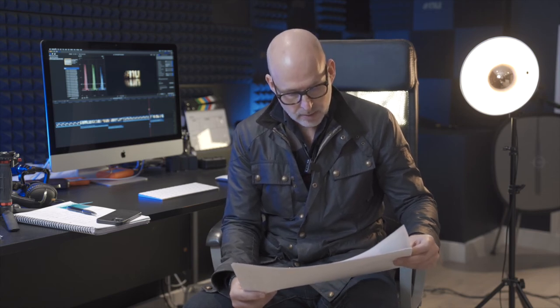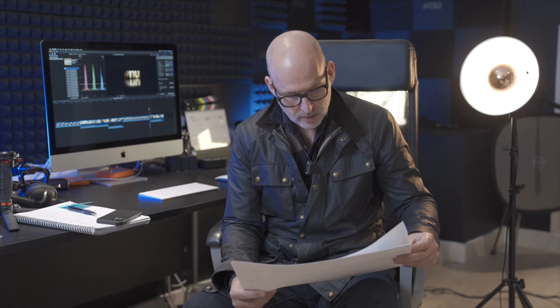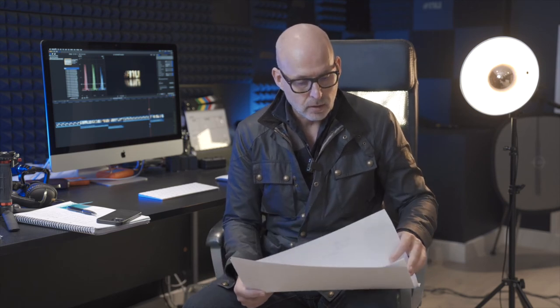So this is what Will O'Brien sent over, the architect. He's our architect who's been speaking to the client of Stafford Mansions. So there's a few changes. The demolition plan is here. There's one internal wall that has got to come down, but all the new layouts have got to be sent over to the management company, because this needs to get signed off and approved before we start taking down walls and putting new steels in, because this is like a 150-year-old mansion block opposite Buckingham Palace. So they're going to be slightly strict, aren't they?